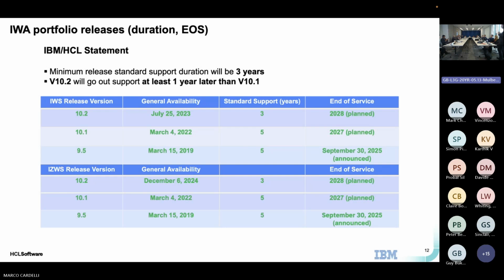We would like to get there, but there are some issues with our database. We're going to have to separate the database out as well. We're going from 1 database to 12 databases and dynamic domain managers. So we've got to build all of those databases and do all of that migration before we can even start migrating the agents. Within an estate the size of ours, it really isn't an easy undertaking, but we do want to do that.